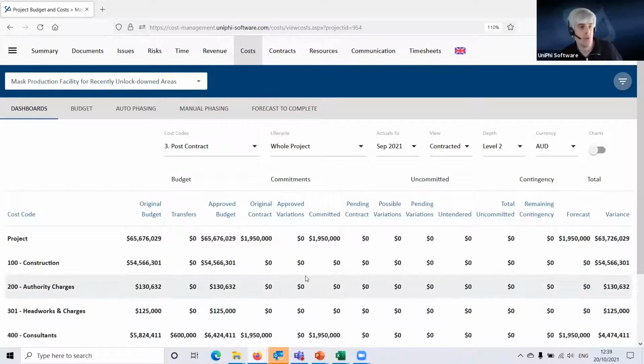You can set rules in Unify whereby that can't happen unless it goes through an approval process. So you could have a process to issue a purchase order for this contract. That gets approved, that changes the status to active, which then reports it as an original contract and a commitment, or a contract approval process, whatever that might be that you need in your organization. Or you can just change the status as I just did in here.